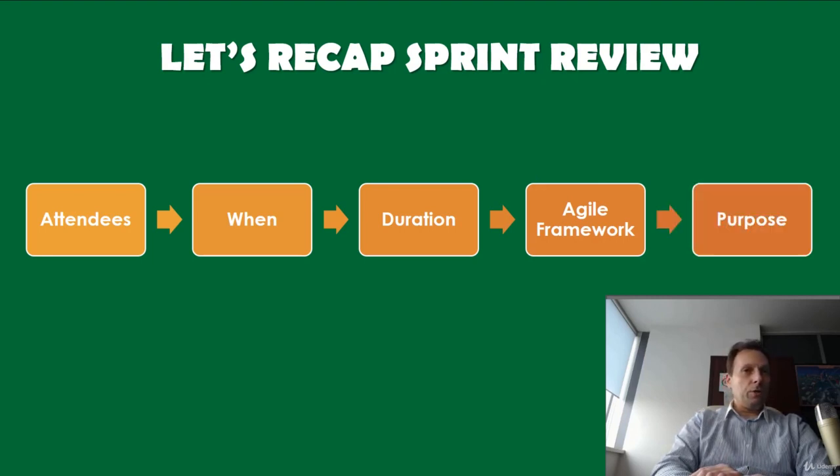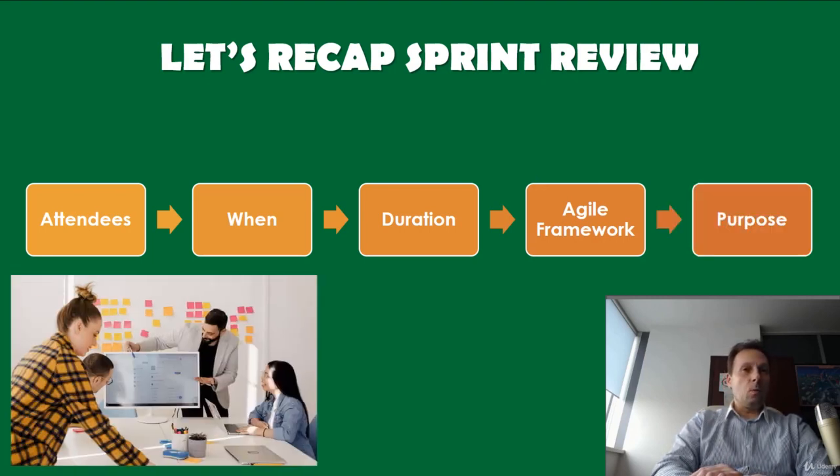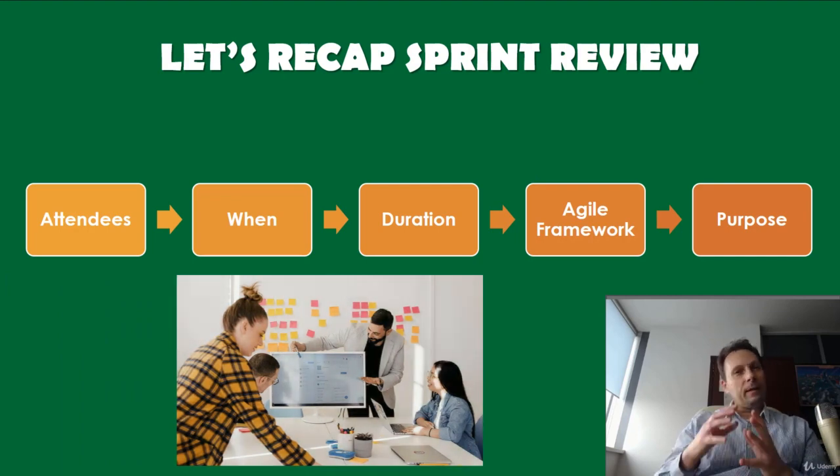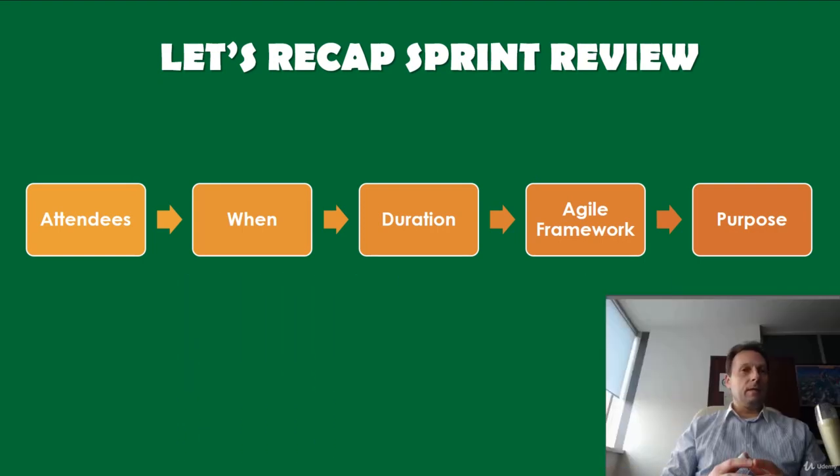Purpose. The iteration review is the time to showcase the work of the team. It can be in a casual format like Demo Fridays or in a more formal meeting structure. This is the time for the team to celebrate their accomplishments, demonstrate work finished within the iteration, and get immediate feedback from the project stakeholders. And remember, the work should be fully operational and meet the team's quality bar to be considered complete and ready to showcase in the review.